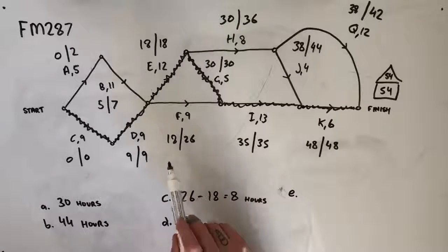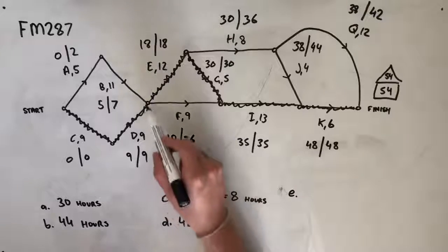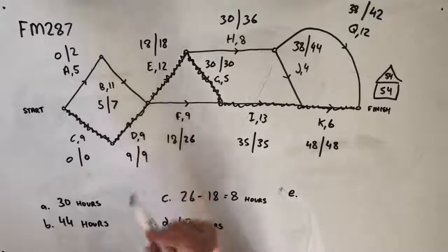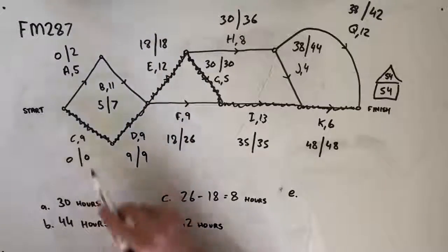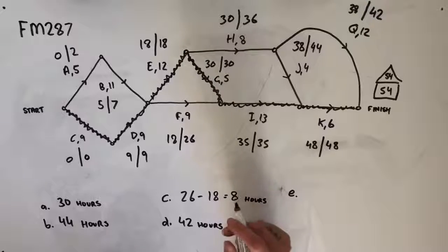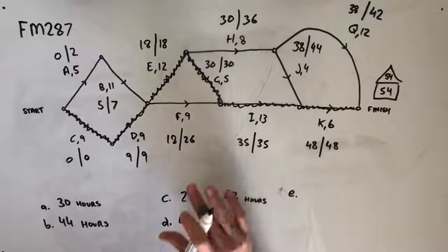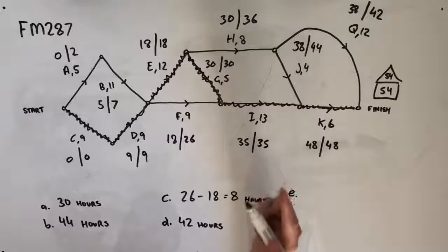However, what won't keep its float times are activities A and B. As we reduce D, that will also reduce the amount of float time along this path up here. And an example, just to show you what would happen. Now, we're able to reduce D by 2 days before our critical path is taken over.